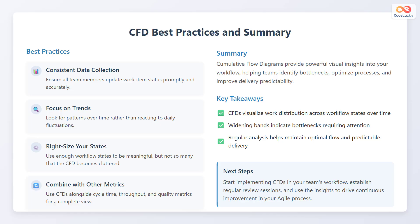In summary, cumulative flow diagrams provide powerful visual insights into your workflow, helping teams identify bottlenecks, optimize processes, and improve delivery predictability. Key takeaways are: CFDs visualize work distribution across workflow states over time; widening bands indicate bottlenecks requiring attention; and regular analysis helps maintain optimal flow and predictable delivery. As a next step, start implementing CFDs in your team's workflow, establish regular review sessions, and use the insights to drive continuous improvement in your Agile process.